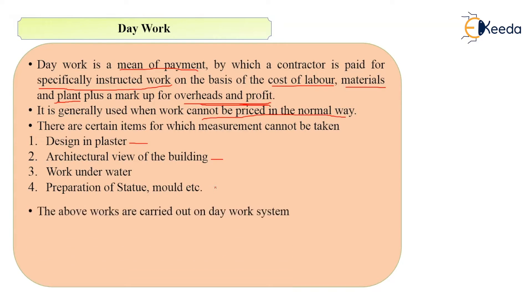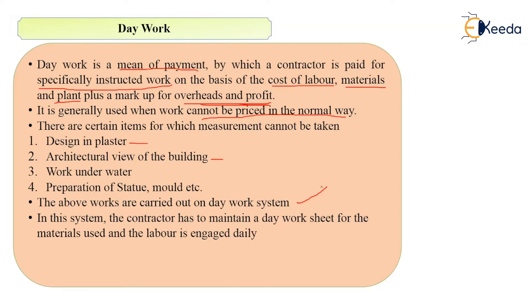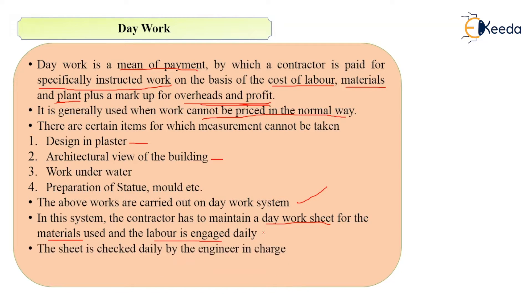Such works are carried out on the Day Work system. In this system, the contractor has to maintain a Day Work sheet — a daily record of how many materials and labors he engaged to complete that particular work. The contractor is paid based on this Day Work sheet, which is checked daily by the engineer in charge.